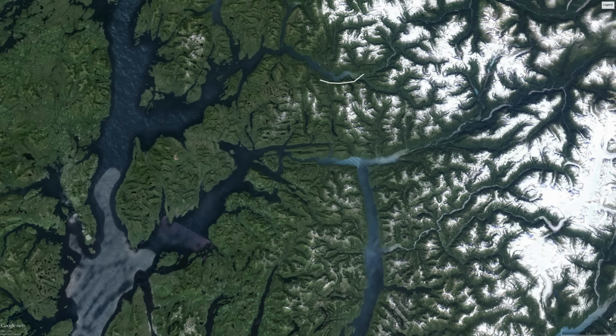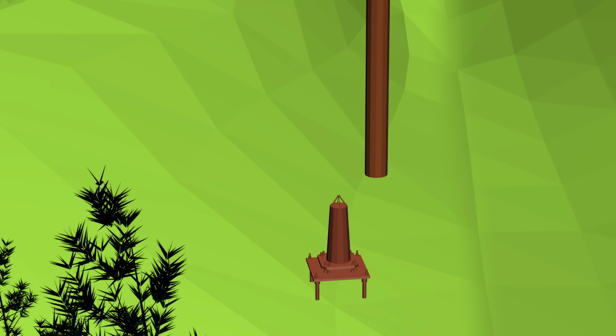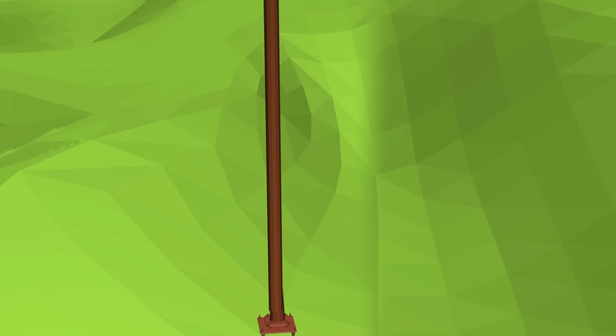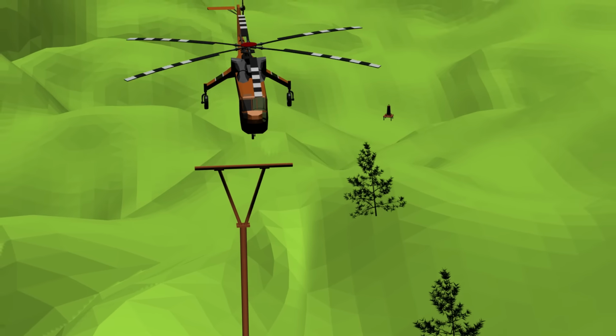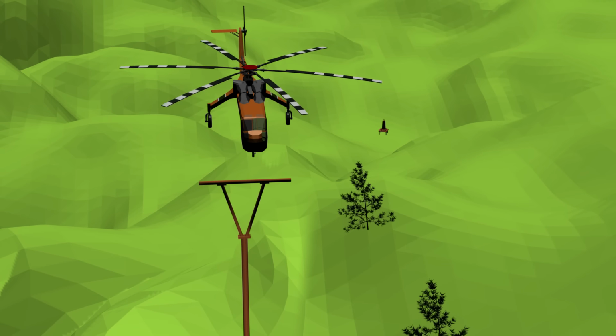Year 2, and all of the wire stringing, pulling equipment, and pole structures would be prepared and flown into 24 separate locations up and down the line by helicopter. The structures themselves would be flown in by an Erickson air crane and placed on the foundations and later bolted down. Guy wires would be attached, and then the conductor itself pulled through all of the structures. Then the linemen could make the necessary finishing connections. End of year 2 and the project.